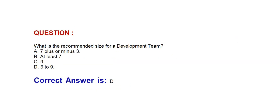Next question: What is the recommended size for a development team? Option A: 7 plus or minus 3. Option B: At least 7. Option C: 9. Option D: 3 to 9. Correct answer is Option D: 3 to 9.